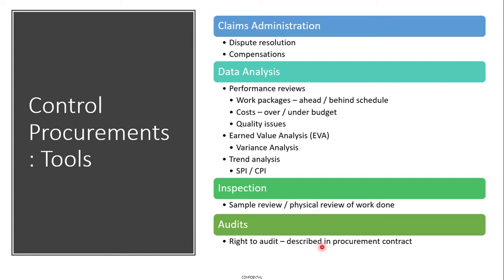Sometimes in certain agreements, if you are the buyer, you can include in your agreement, especially in larger procurements, the right to audit the supplier, and you send an audit team to the supplier's factory to see whether he adheres to the quality standards you have specified in your procurement documents.